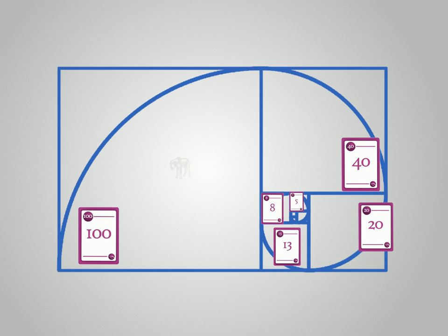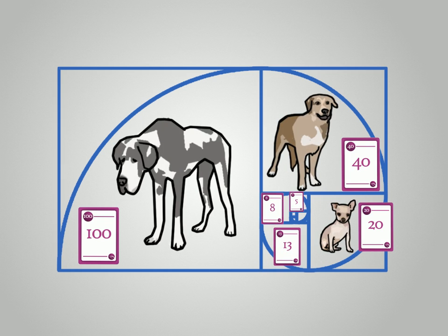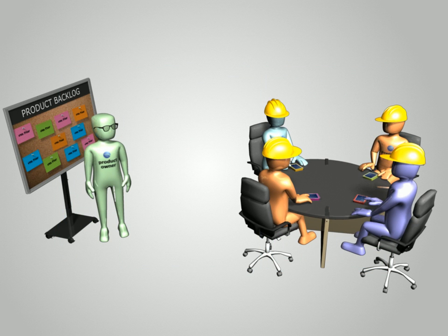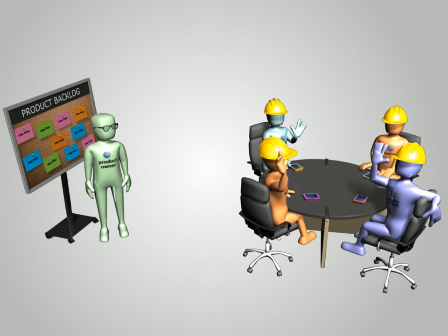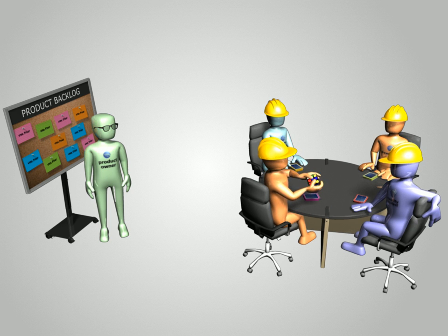Remember that story points are relative values, not absolute. There is no direct correlation between hours and points. Story points are created by and are specific to the team that estimated them, and will likely include a degree of complexity that is understood only by the team doing the estimating.